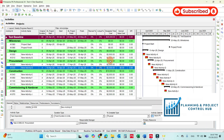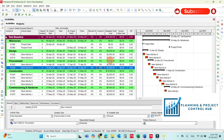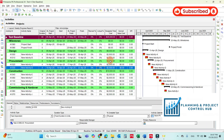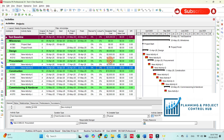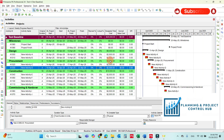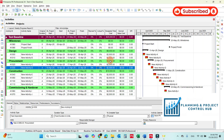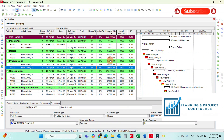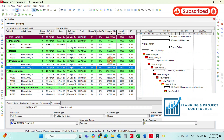Now we are going to start updating progress in the approved baseline. A question arises — from where do we get the progress data? The design progress will be provided by the design department through the design log. The procurement progress will be provided by the procurement department through the updated permit log. The construction progress will be provided by the site team by updating the quantity measurement sheet every week. Let's assume we have received all the data from the site and each department.